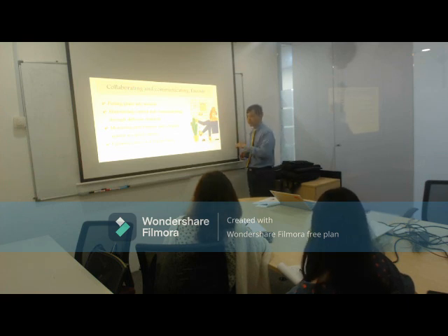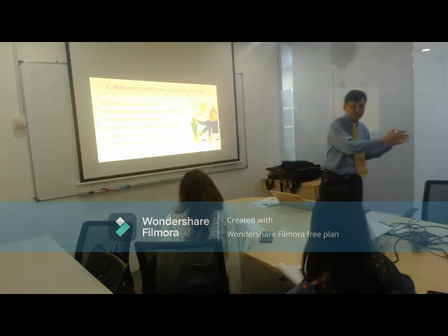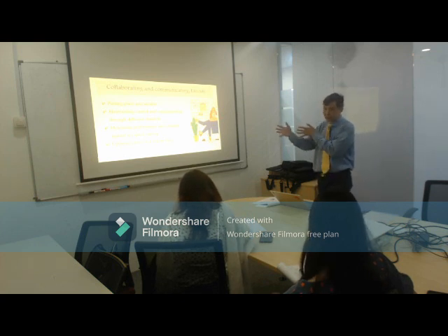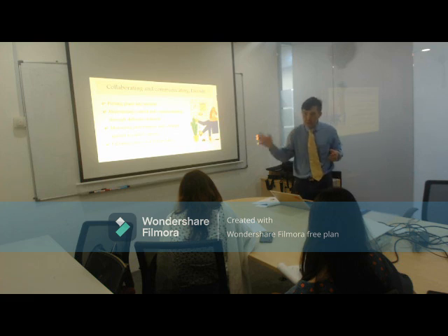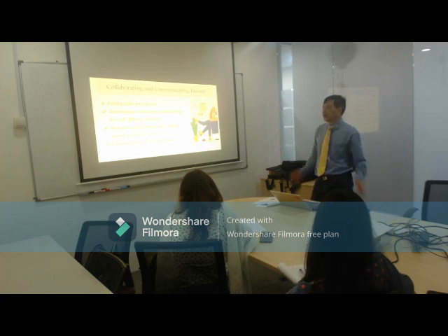Yeah, so for example, we wanted to start painting the room, right? We wanted them to clear everything out. So the performance is what? Jack, who's supposed to clear the place, needs to be able to do it within a particular amount of time, make sure that nothing is broken, and make sure that everything that is moved out is labeled so that he knows how to put it back again.